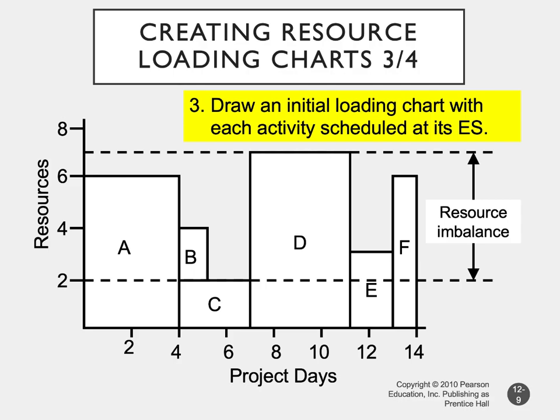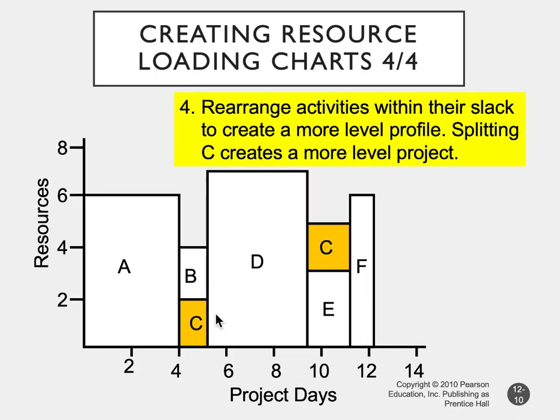Just estimated time. So with that, we will add the slack time, for example. On the next slide we will see it in orange or bright yellow. This will combine or compress the project days, where for example task C is being split up. Here the task could be completed within day 5 and then be continued probably after day 9.